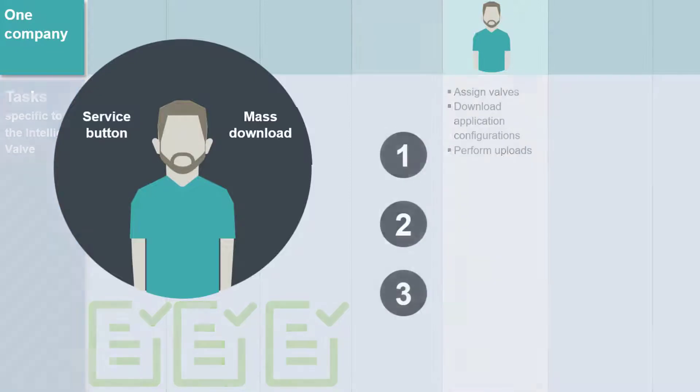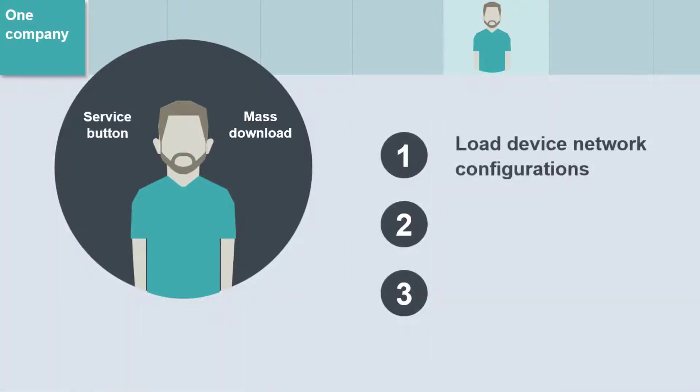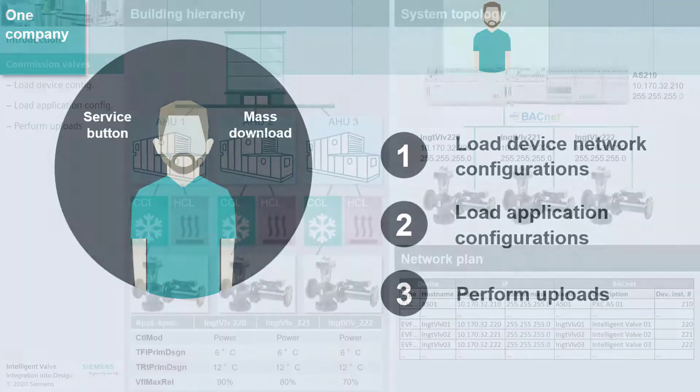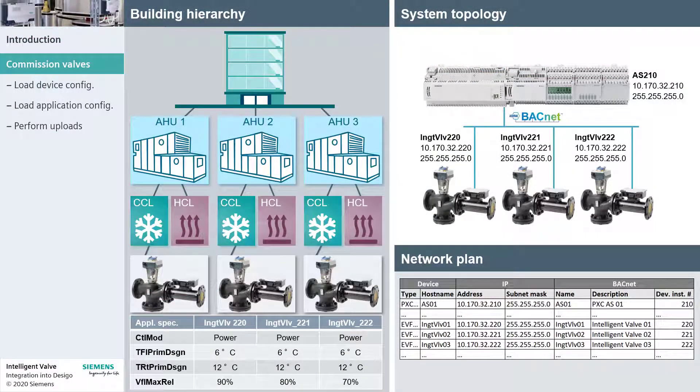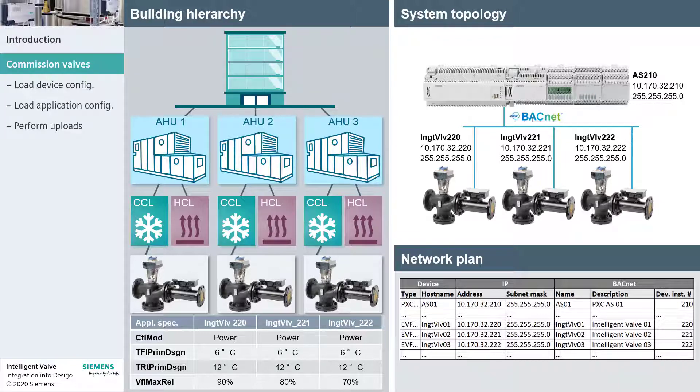The main tasks involve loading the device network configurations, loading the application configurations, and performing the uploads. The project implementation follows the same building hierarchy, system topology, and network plan as introduced in the previous videos.